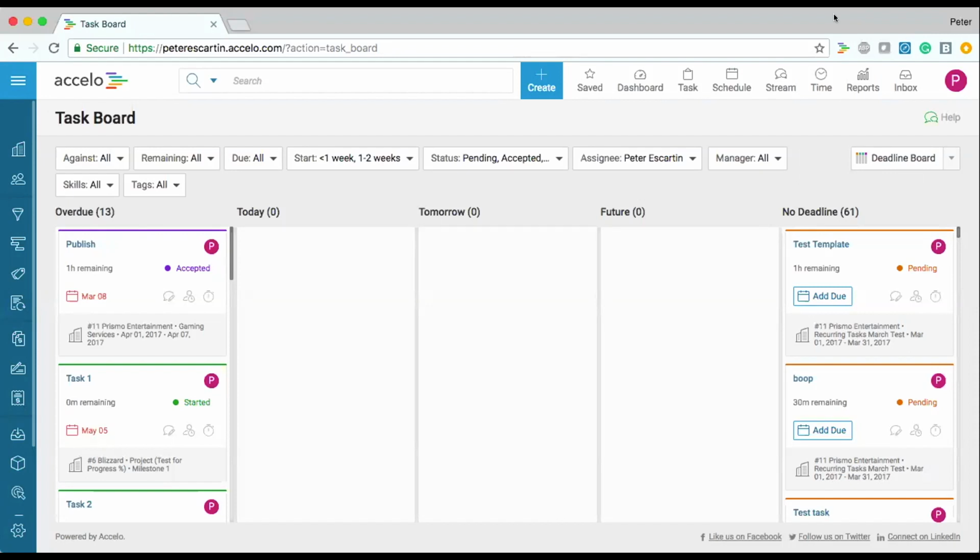And we're going to begin with answering the question: what are billable and what are cost rates? What's the difference between the two? Simply put, cost rates are what we charge as an employee to our employer. So it's basically our hourly rate. So it's the cost to the employer for an hour of that employee's time. Now, our billable rates are what we charge our clients for an hour of this person's time.